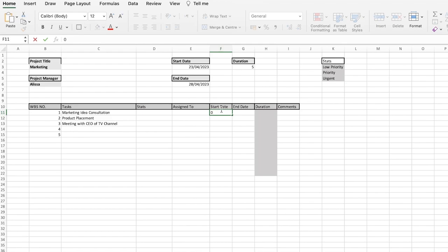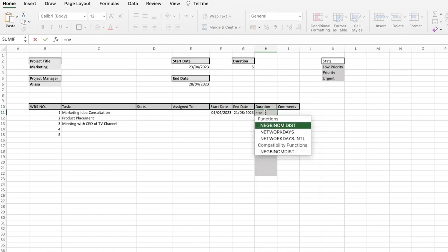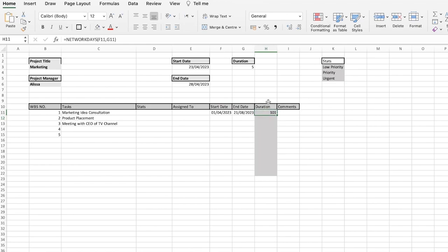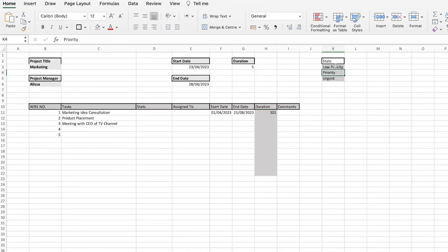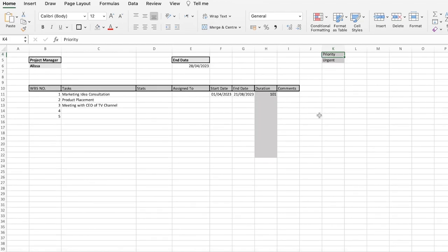For each task's start date and end date, to calculate the duration I can click on the cell, type =NETWORKDAYS, enter the start date, add a comma, select the end date, and press Enter — so this shows a one-day duration. I also have a comments column, which keeps everything nice, simple, and organized in the Excel sheet.